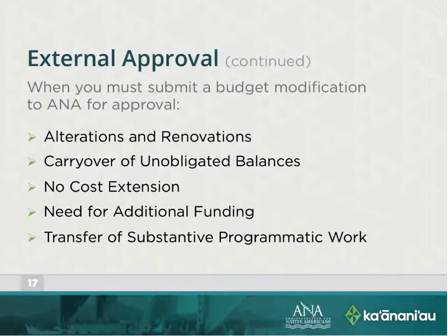Carryover of unobligated balances. And this is a biggie. First, let me just say that carryovers are not an entitlement grant or anything like that. They're solely at the discretion of the awarding agency. The awarding agency may choose to allow carryovers, or they may choose to use unobligated balances to offset future awards, or they may put it back into play to make additional funding decisions.